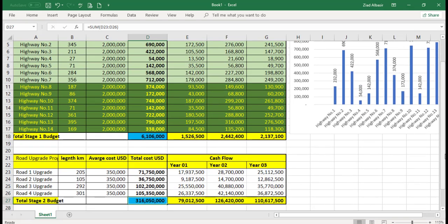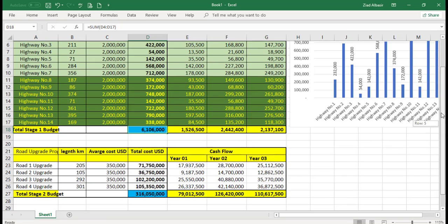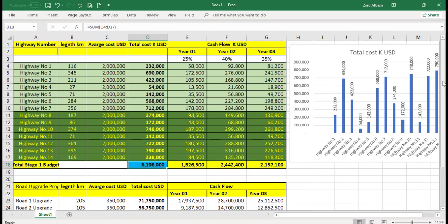Now, as I said, 15 billion is the annual budget for this country. 15 billion is big money. And for the highways, they are allocating only 1 billion a year as a start. Now, thinking like this, comparing to other requirements in the government for salaries, social benefits, schools, etc., that 1 billion means this highways project with this estimate will go for 6 years minimum, not 3 years as we really need and hope. So they have to look for loans or funds to accelerate their work. But the allocated budget for these highways is 1 billion a year. So we have to think about it.